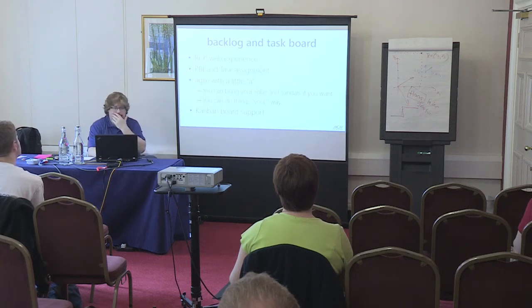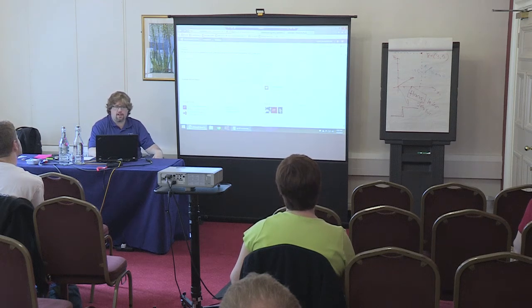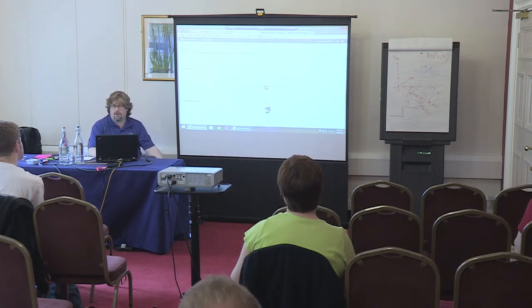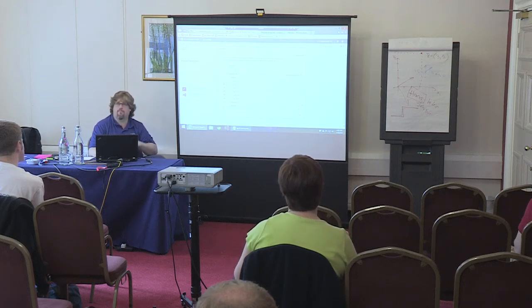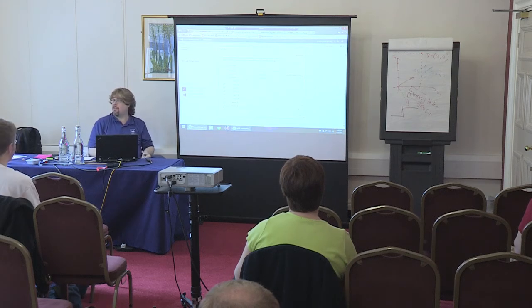Let's talk about the backlog and task board. So whenever you start to work on a project, you might need to figure out what you're doing, right? For any good team, you have an agreed upon set of work you're doing, so you need a backlog. So the first thing you do when you create a new team project is you want to configure your scheduled iterations. What are our time boxes? They give you this default setup, which is 6 sprints with no dates. You can reconfigure this how you want. I have some team projects that are just rolling work, so they have sprints that are just the names of the month, right?